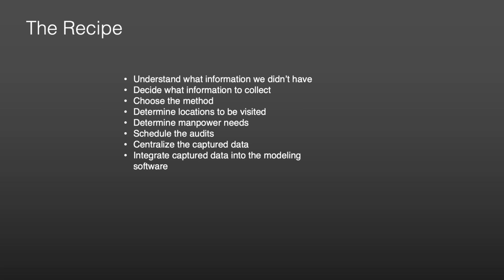I was very fortunate in the very beginning of the project that we took on for our telecommunications, of being able to get a glimpse of what we had as far as communications rooms based on some GIS data beforehand. And with over 900 rooms, I could determine how many personnel I was going to need to stick in those rooms. So having that information at my fingertips was pretty handy. And then we had to schedule audits, centralize and capture that data, and then integrate that captured data into the modeling software.